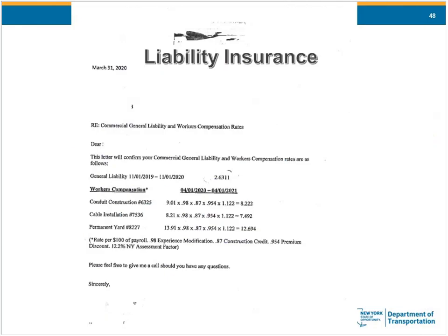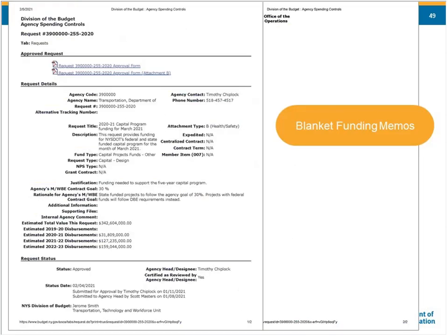So those are your agreed price and force account package examples that you'll be attaching to your header. Eric discussed, if the net value of your change order is in excess of $20,000, you need a funding memo attachment to your header. This is an example of the March funding memo. It's actually a 2-page at the moment. Why they can't shrink it into one, I don't know. But you'll attach this as a PDF to your header.